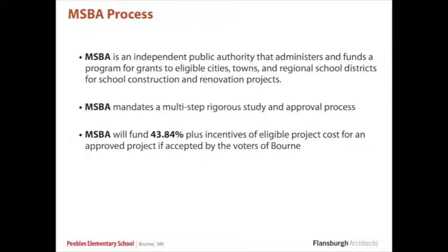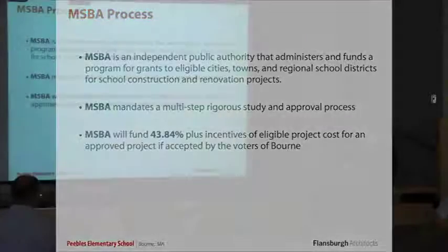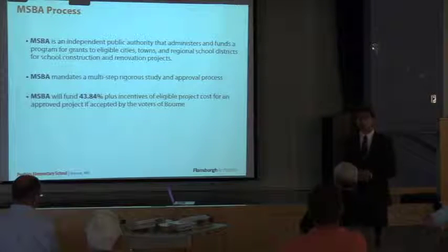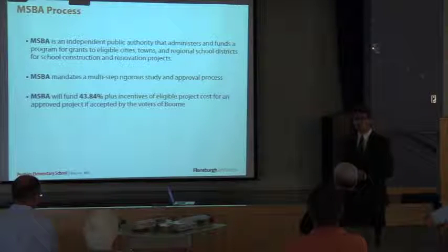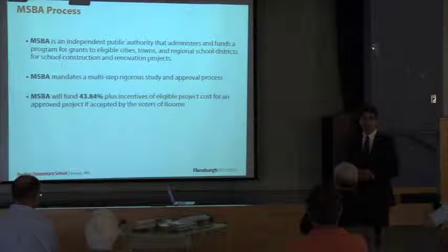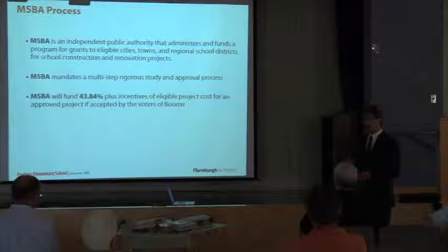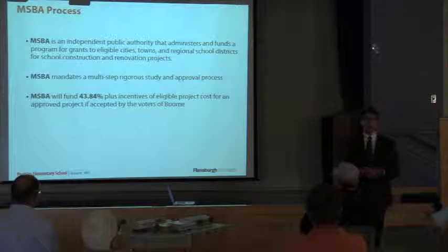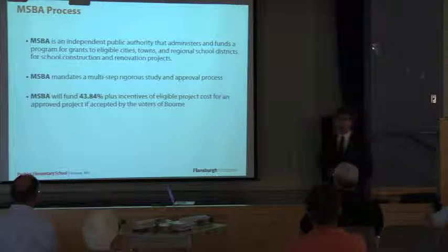They are a partner with all local communities, providing guidance, structure for the feasibility study as well as the design, very substantive regulations and guidelines to follow for each community. And if you follow those guidelines and those regulations in partnership with the MSBA, they'll provide a grant to each community. In our case, that grant will be 43.84% of eligible costs as we go through the project.